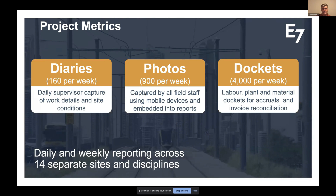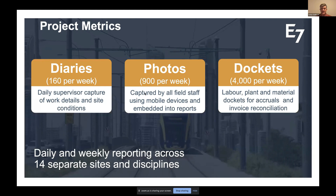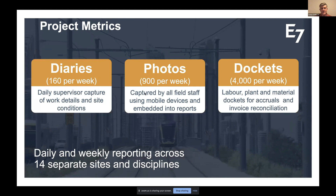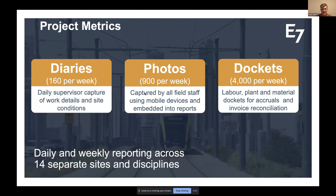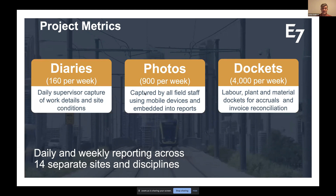The captured data provides insight to engineers and supervisors so they can assess how much progress they're making. If we've captured costs daily and progress daily, we can combine those to generate a daily production rate and compare it against target or budget rates. This is the key to improving productivity — giving field supervision and engineering teams the insight to decide how much progress was made, what it cost, and where things are heading.